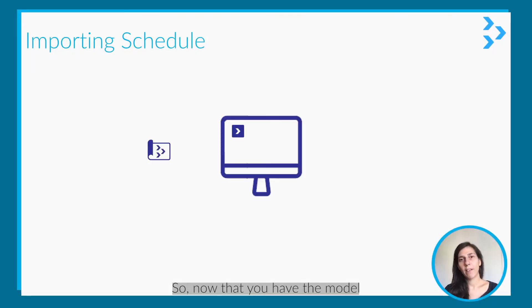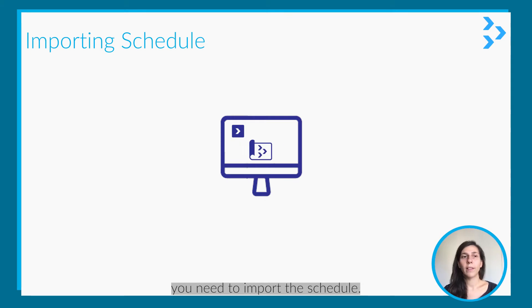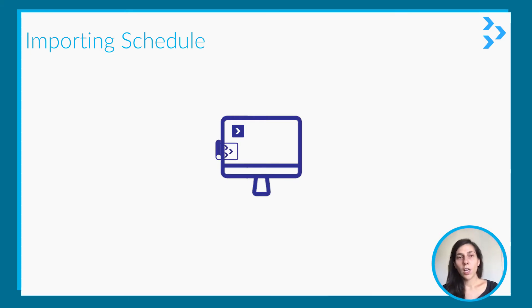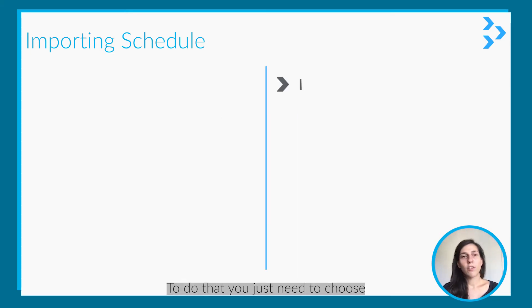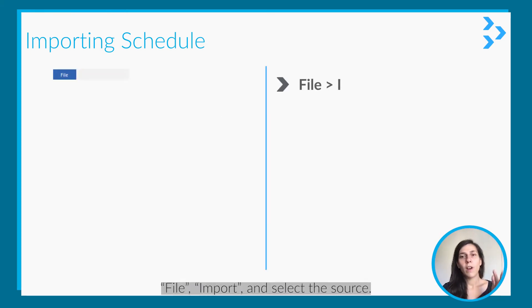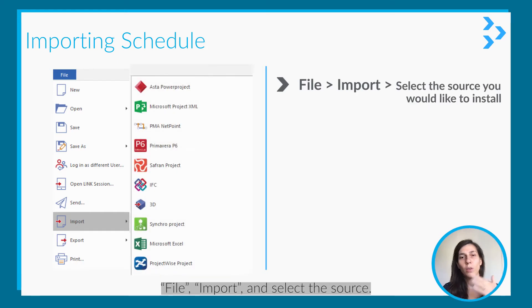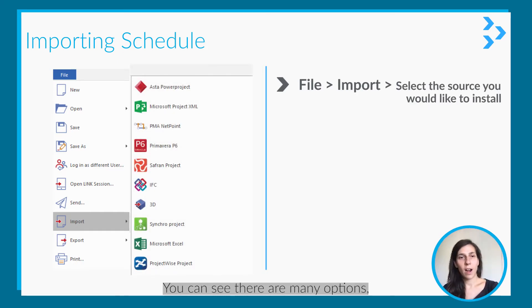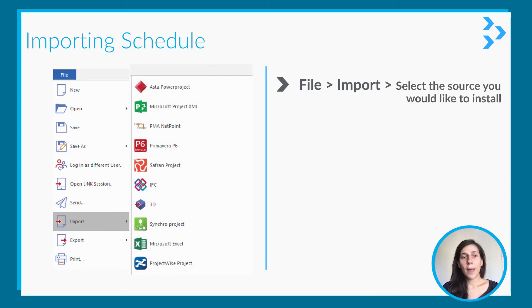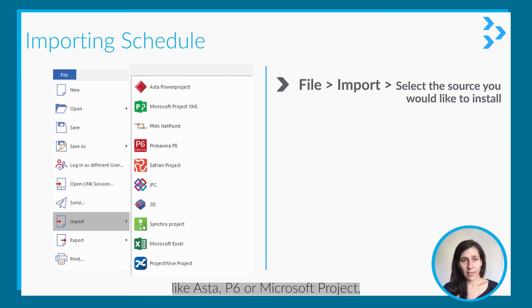Now that you have the model, you need to import the schedule. To do that, just choose File > Import > Select the source. You can see there are many options like Asta,